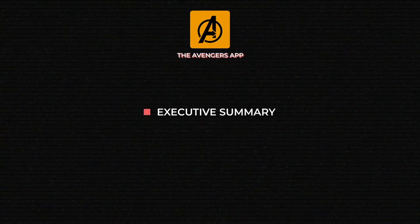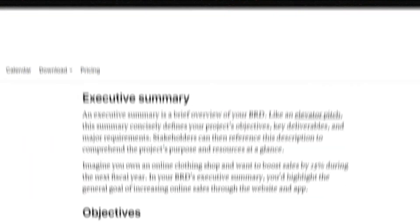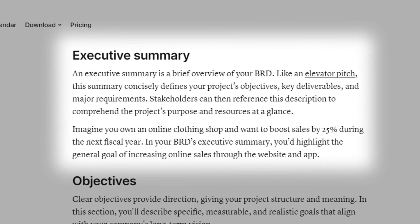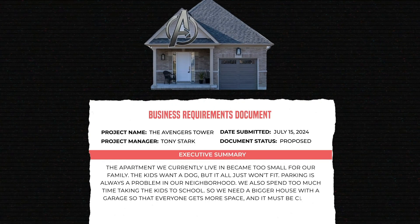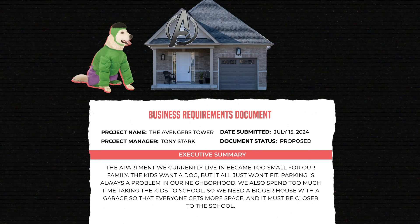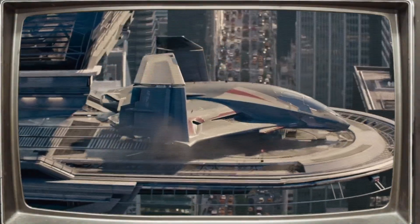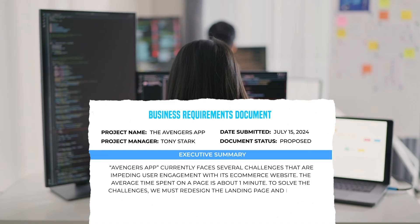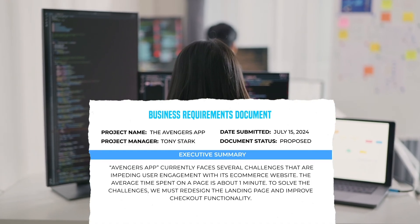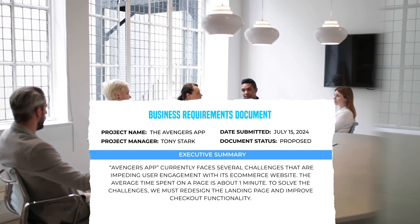It all starts with an Executive Summary — a short description of the project's background and main target. Though it's usually just a few paragraphs long, it must explain why you initiated the project at all. Getting back to our house construction example, an Executive Summary could be something like: the apartment we currently live in became too small for our family; the kids want a dog but it all just won't fit; parking is always a problem; we spend too much time taking the kids to school. So we need a bigger house with a garage, closer to the school. For a software project, write about the specific challenges you want to address and the proposed solutions. It's also the right place to provide relevant statistics or market data to add credibility and justify the need for a project.